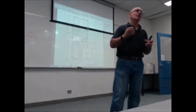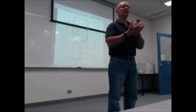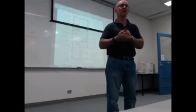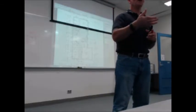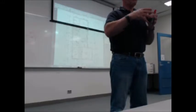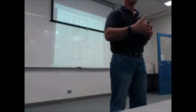The process is you can move in, you can accept practical completion, but you have paperwork to state that there is a defect that needs to be rectified. So the builder has given you written confirmation. You can help me in here, Danny, because you might know the process better. That there is a defect and it will be attended to within a period of time, wherever it happens to be. So that way you get in. What do you expect the builder to do in this situation?